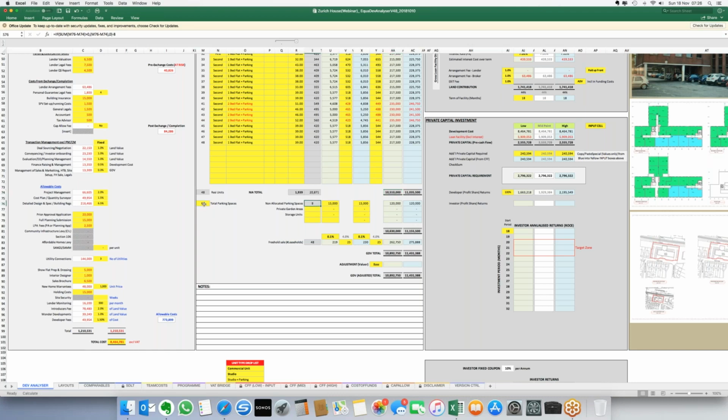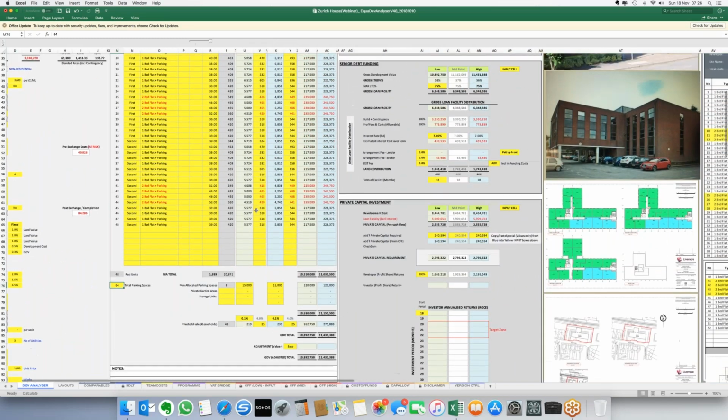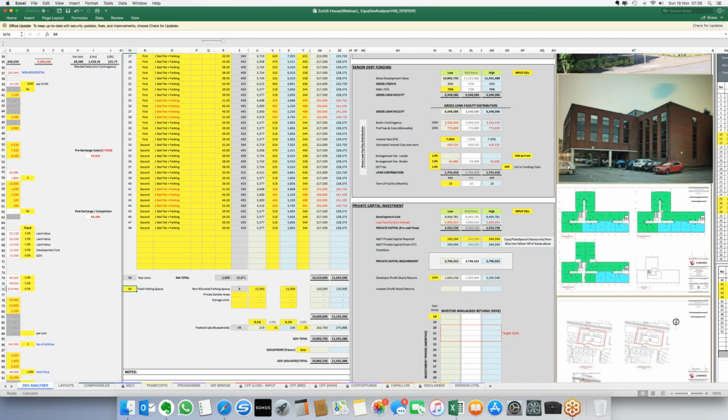So we've got a total today of 64 parking spaces. These are fully compliant parking spaces. However, we're going to lose 8 of those. Now, those 8 are associated with this undercroft area here, as you can see on the photo. The intention of the scheme is that we're going to infill between these columns and on the outside of these columns, and create 4 apartments at this level. In doing so, we're going to lose 8 parking spaces. So straight away, from the 64, we take 8 off.